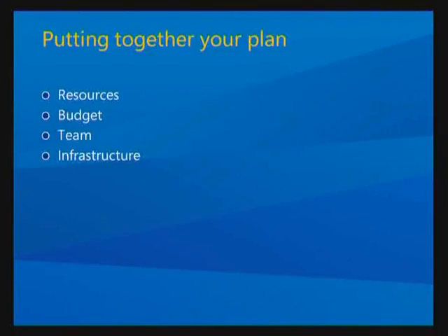So, putting together your plan. This is where a lot of people get stuck as well. Not that hard. There's only 4 things. What resources do you have available? So this is, what hardware do you have? What space do you have even? What bandwidth does the team that's already in place have? Is this something that you're going to do in-house, or is this something you're going to outsource?